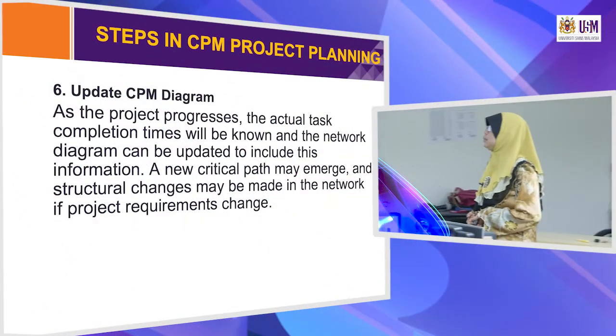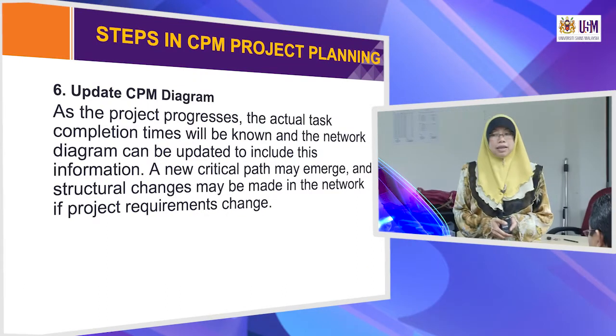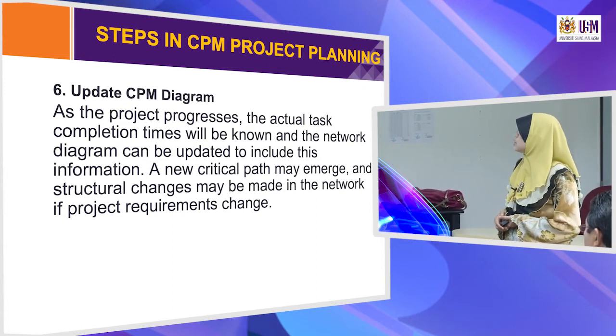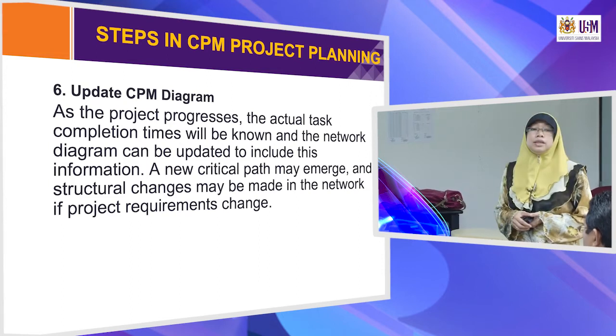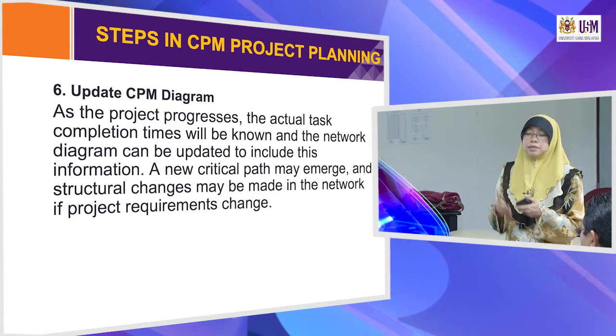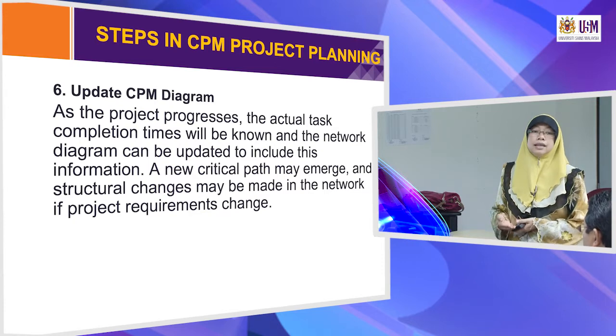And update the CPM diagram. Okay, you must update. As the project progresses, the actual task completion time will be known and the network diagram can be updated to include the information. Update and update and update. What has been done, what has not been done, and so on. What problems occur during the planning. You expected to get 5 sponsors but you get only 4 and so on. So you must update.